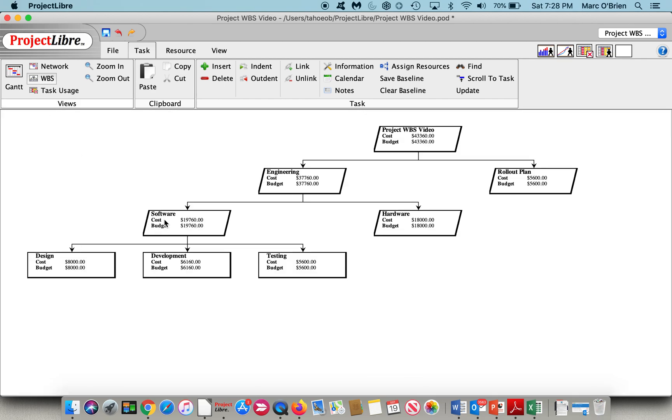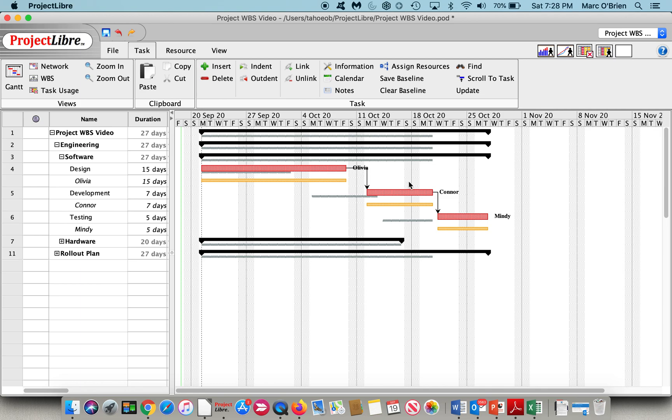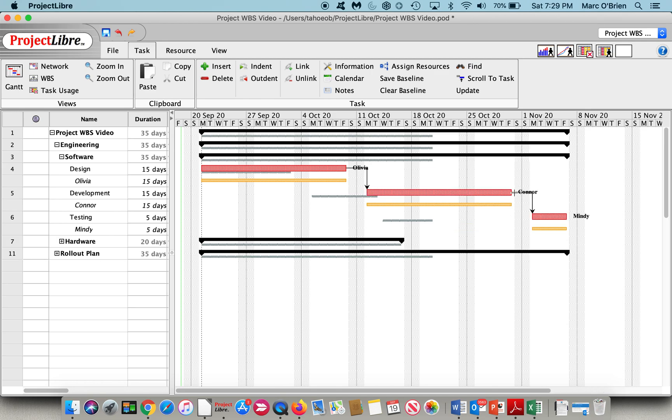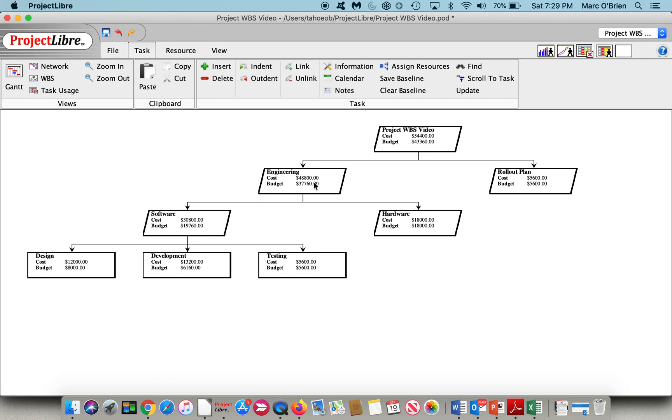So now you can see the budget for software aligns with the current cost. However, if we go back to the Gantt chart, and we change durations, so we make design 15 days, and let's just make development, let's extend that out as well. And again, the costs on that are associated with the resources. If we go back to the WBS, we are going to see on design and development, the budget stays at $8,000, as our baseline was, but the cost is now $12,000. And the same thing with development. We've got a variance there. We didn't mess with testing, and so the budget, which was the baseline, and the costs stay the same. And you can see that those costs roll up to software, also to engineering. And again, there's a variance at the entire project level.